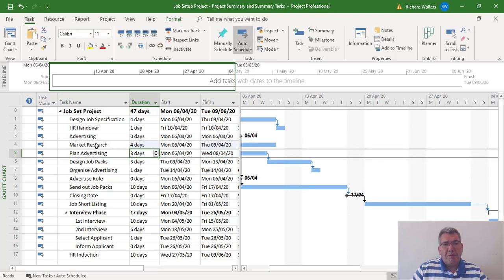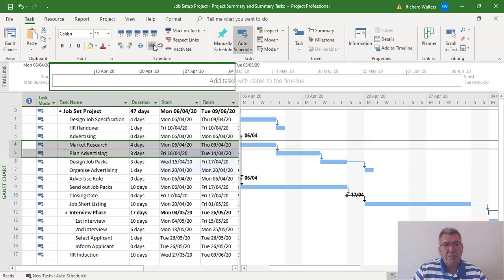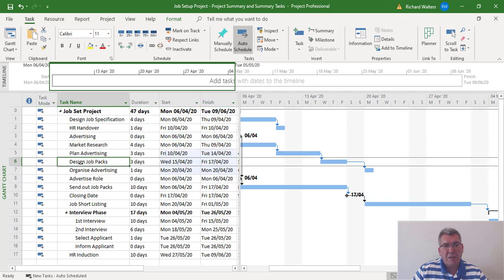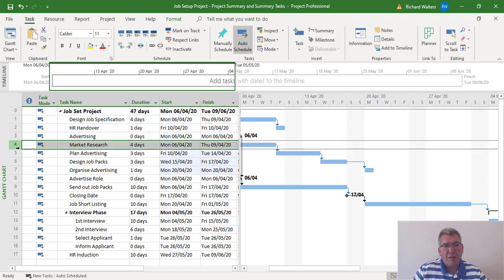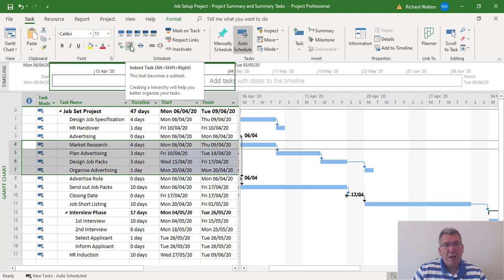I want that to be a four day task and a finish-to-start link with plan advertising. So I'll highlight rows four and five and choose the chain to link them. Now I'll put the summary task back in, now that the task is in place. I'll highlight four, five, six, and seven, and indent task puts the summary task back in.